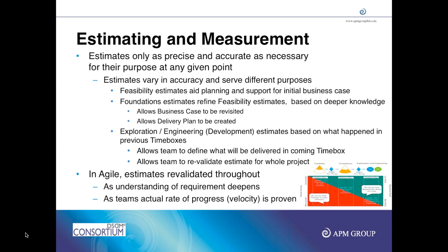Apart from that, if there are any stories, like for example, a payments module, and most people have given it a higher rating, say everyone has given a rating of 80 or 100, these are called large stories, and then you call them epics. You can have a rule that no stories will go beyond a certain number, like 21.